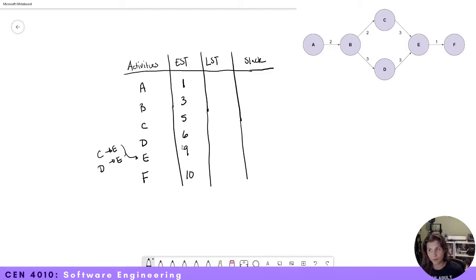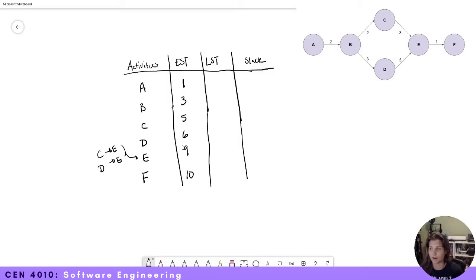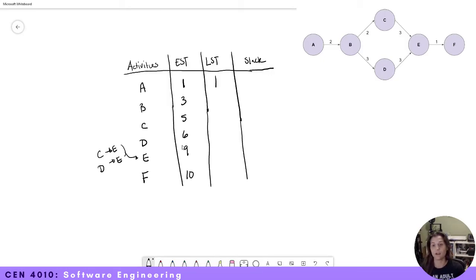Now that we've calculated our earliest start date, let's calculate our latest start date. For A, the latest start date is the first day of the project. If we start later, we end up delaying the entire project, so the latest start date is one. For B, this is the same idea — we need to start it on day three, otherwise we delay the entire project.